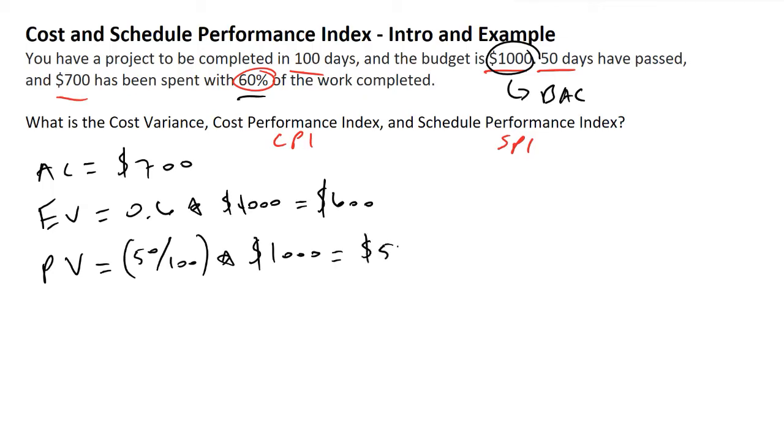This tells us that according to our schedule, if we assumed a linear schedule in this project, we should have created at least $500 in value for this project.